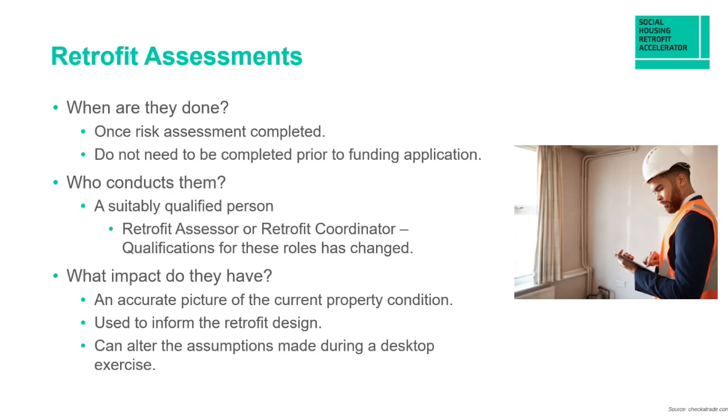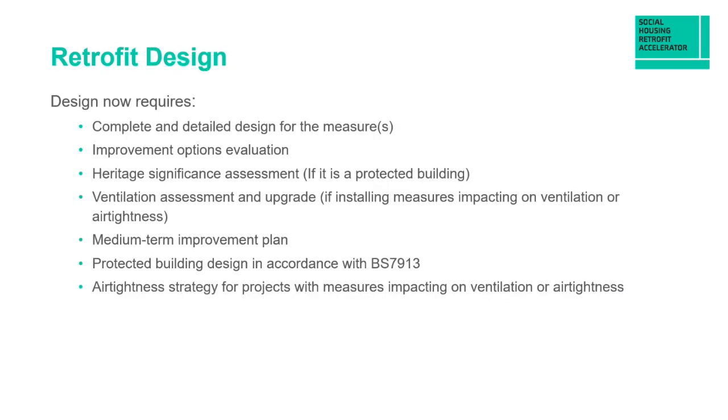And what impact do these retrofit assessments have? They help paint an accurate picture of the current property condition. The retrofit designer and coordinator will use them to inform the final retrofit design, and it can alter assumptions made during a desktop exercise. Some of the lessons learned from earlier iterations of SHDF are that the retrofit assessments can sometimes have a lot of changes from your desktop exercise carried out at application stage.